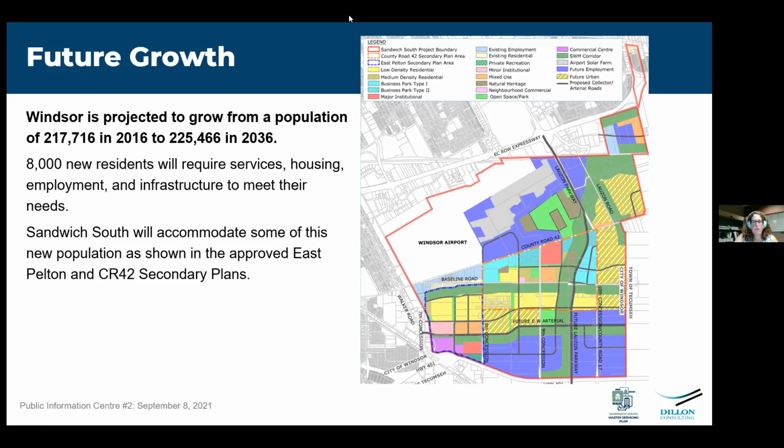Yeah, so the active transportation will have to be suitable for the roadway that it will be on. In the Lausanne Parkway instance, there are multi-use paths that are off-road, but we are looking at two examples of what could be looked at: cycle tracks and also protected bike lanes. There are a number of different facilities, and the actual facility proposed on each collector road would have to be suitable to the type of road being proposed. So we aren't being very specific on the exact type of facility. That'll need to be evaluated at the next EA planning stage, and also in detailed design, because there are a number of factors like parking and driveways and other components that need to be considered.